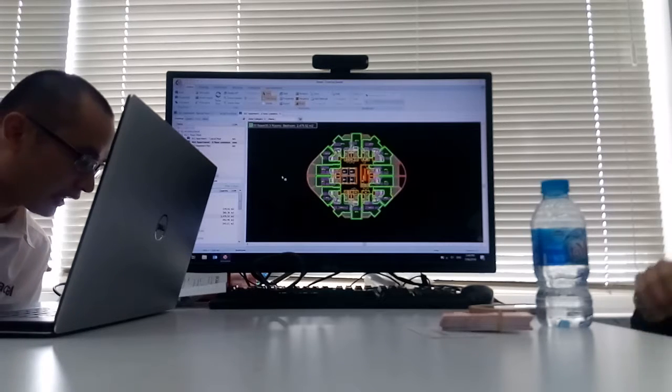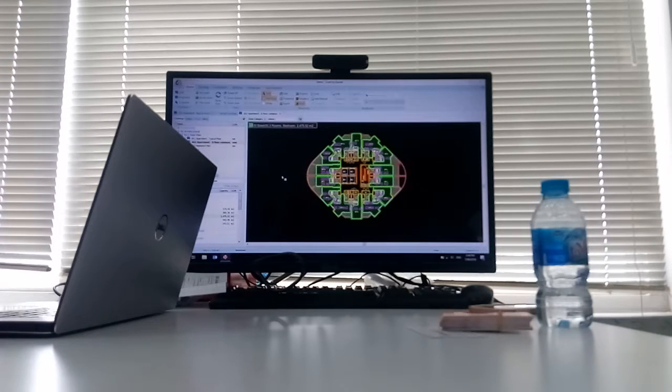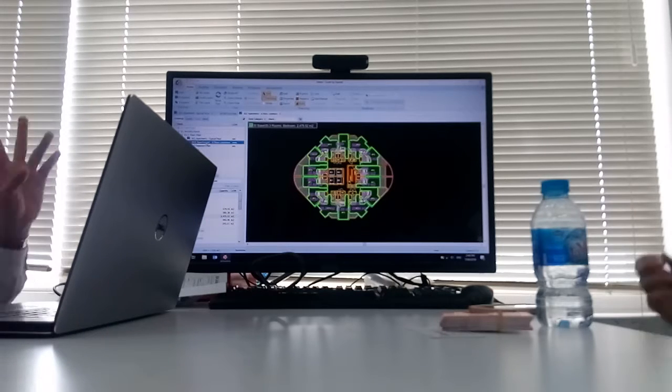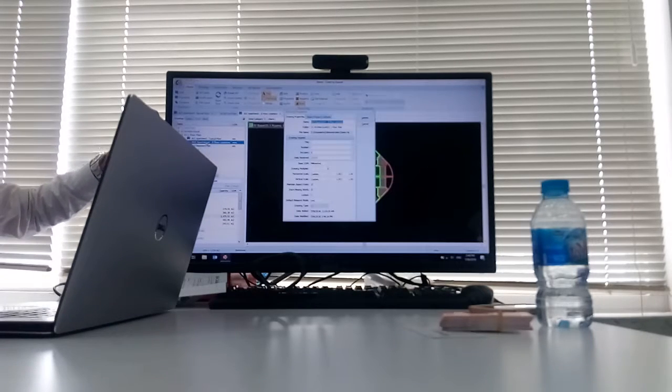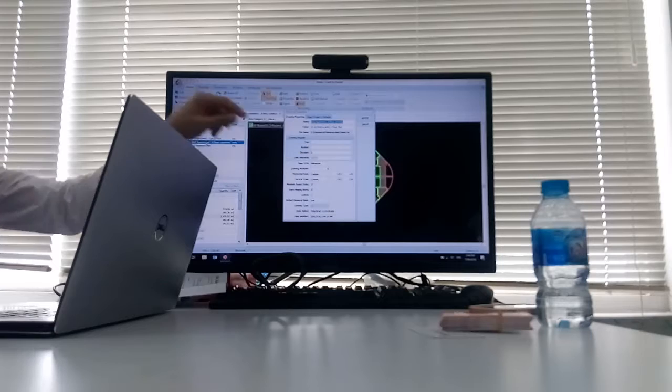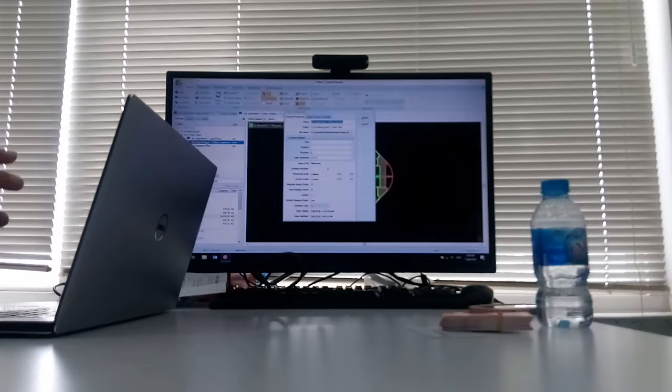So number 5, copy and paste. This is pretty straightforward. Just for example, I've done one of this bedroom or the area. If we have the other drawing, there are a few methods. Either when you first insert the drawing, let's say 8 floor commons, you can insert the multiplier here directly. So everything you measured, you multiply by 8.